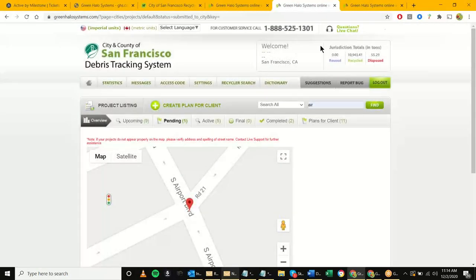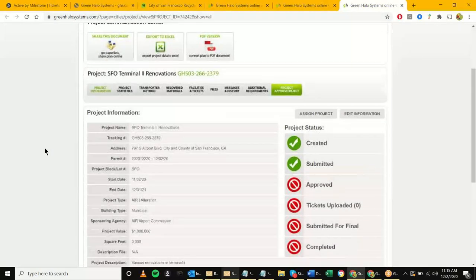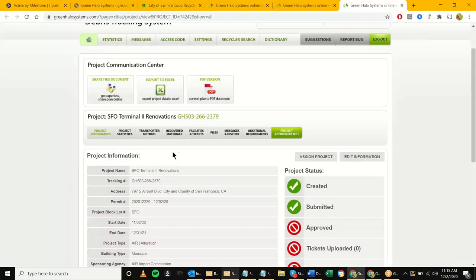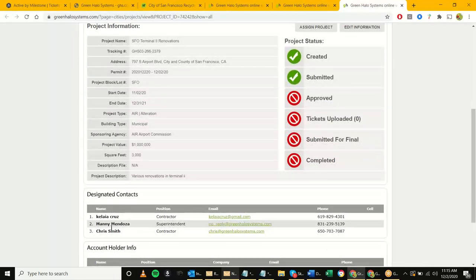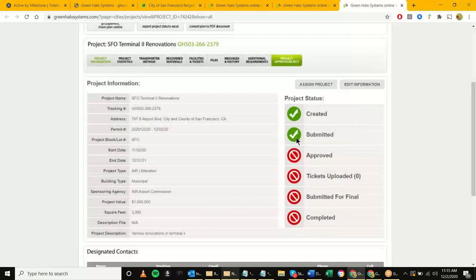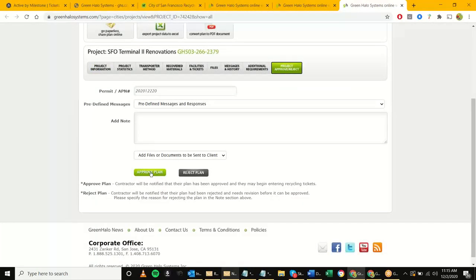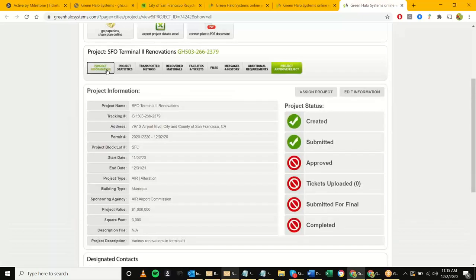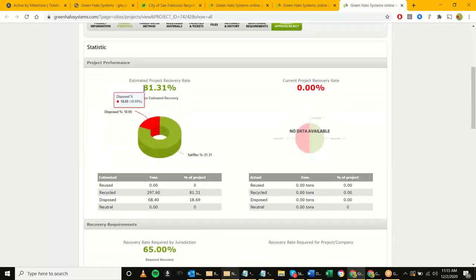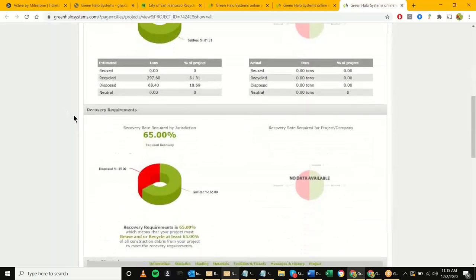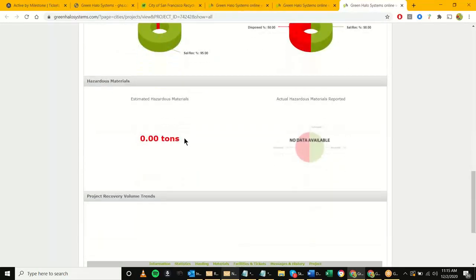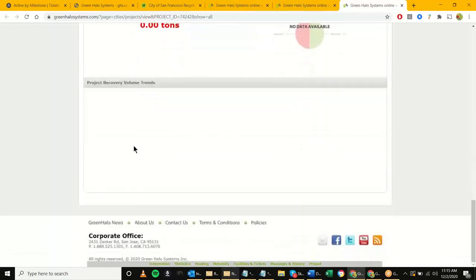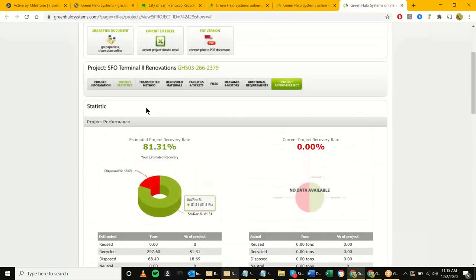The goal is to go into your project and review the plan that just came in. Here we have the project information already compiled, the designated contacts, the account holder information. The project status shows it's been created and submitted. The goal is to hit 'Approve Plan.' To get there, you need to look at the project info and project stats — things like their estimated recovery rate, the required recovery rate, a breakdown of inerts and non-inerts, and any hazardous items shown in red.